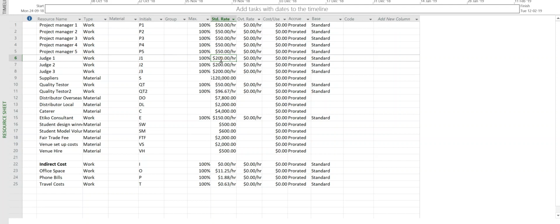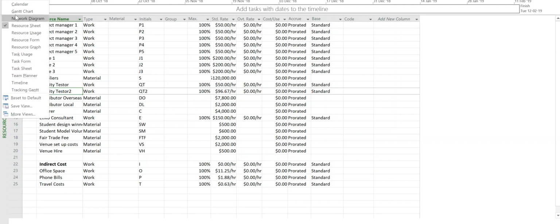We've actually changed the amount of time, and we've done that across that group. We've also added some additional resources into it just to justify the crashing activity that we've done. That's why you need to create a bit of an argument about how you've crashed. So you put those additional resources in and you link it back to the task, and it means the task doesn't get over allocated.